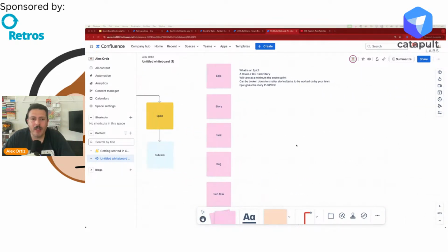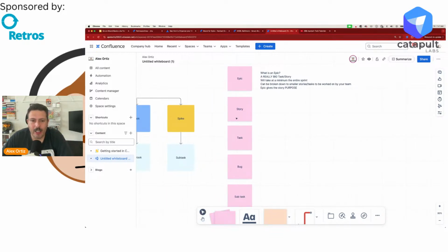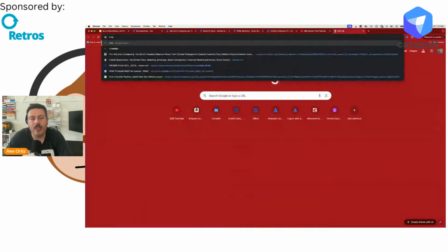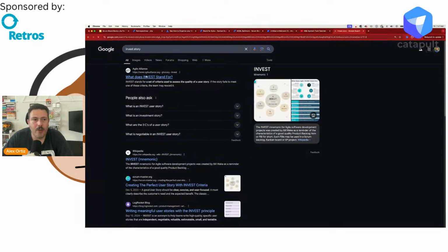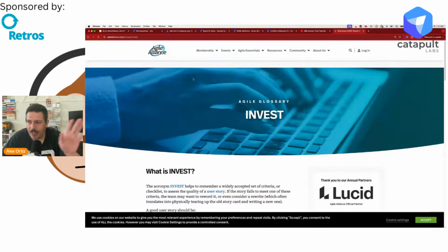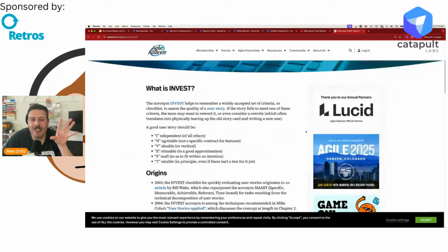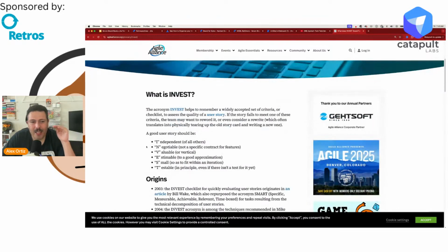Okay, so as we finish defining, I'm going to take my text box here and ask, what is a story? So what should a story be? Well, this is where I like to invite you to look at INVEST, right? I'm not trying to get you to invest in Bitcoin. Don't worry, it's not going to be a crypto scam. But I want you to invest in this agile terminology: a good user story should be independent, negotiable, valuable, estimable, small, and testable. When you're writing your stories, you should be governed by this principle.